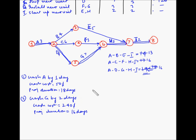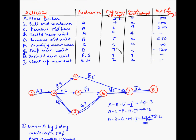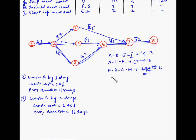Now if we want to crash the project further, we have two critical paths: A-C-F-H-I and A-D-G-H-I. Note that G has already been crashed by 2 days, so its remaining crashable time is reduced. Since we can't crash just one path while the other remains at 16 days, we have to crash both paths simultaneously.